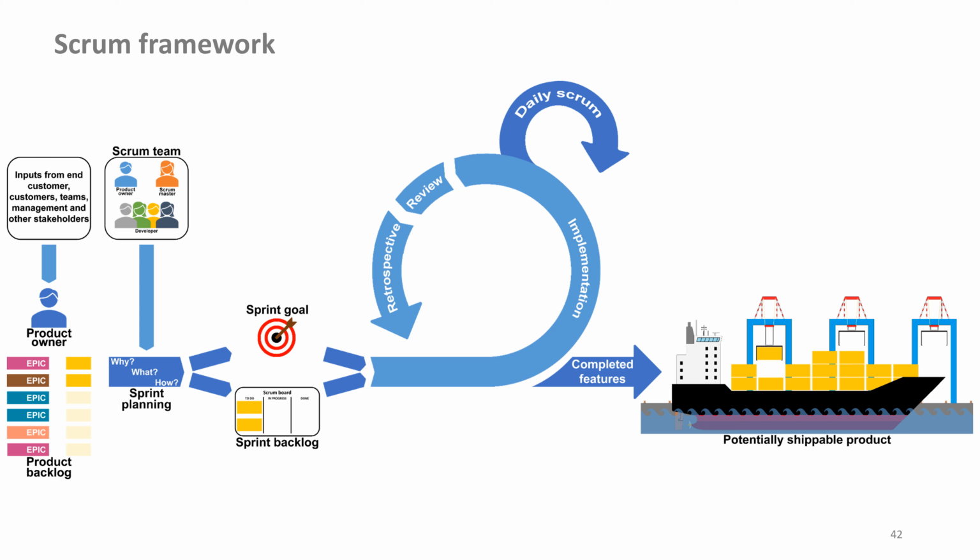Every sprint, the team thinks about which improvements could help to become even more effective. Then they decide on 1 or 2 improvements which are taken over into the sprint backlog. You have 1 improvement in every sprint.